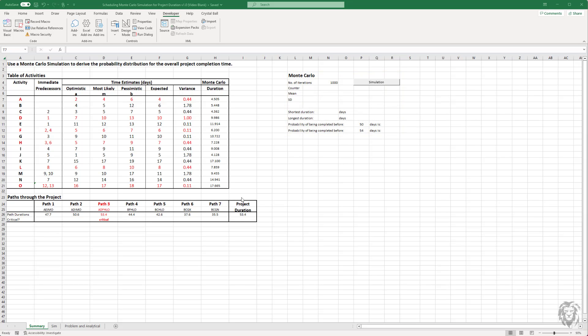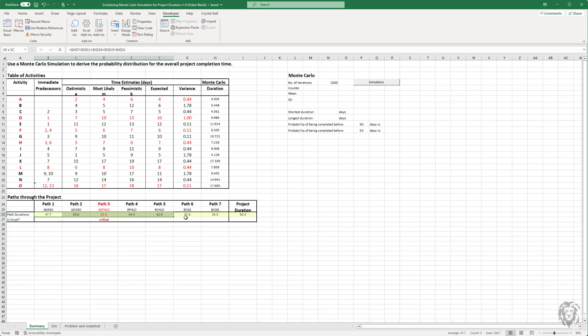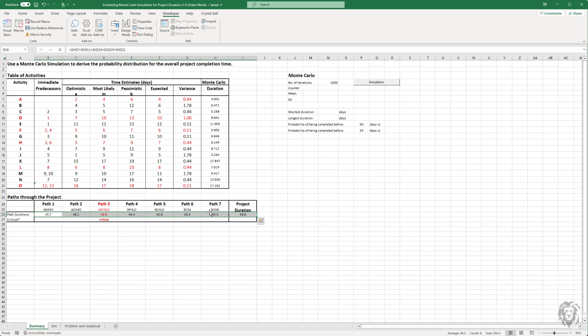All we need to do in this case is rather than use the what-if function within Excel, I'm going to use a little bit of Visual Basic just to manage my data and build up my own data table. The random number function, because it regenerates every time we do something with the spreadsheet, it's going to take care of all the math and the mathematics and everything else. So we're basically, if we look at this line here from our path through the project, all the different path durations and the project duration, we're going to copy this.